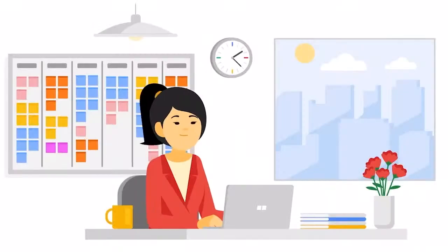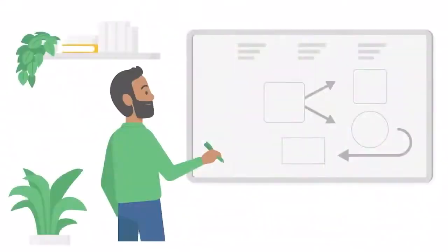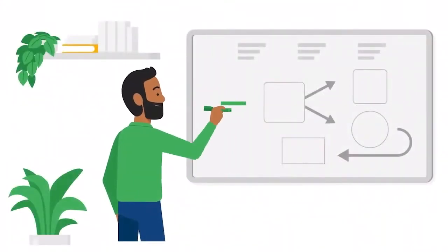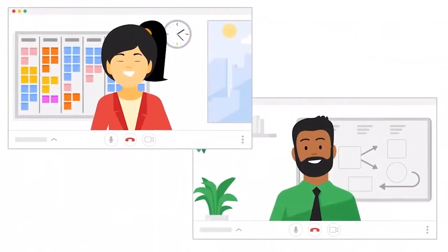You could achieve collaboration by making sure that business people work near the development team, ideally in the same office or virtual space. If that's not possible, maybe co-locating a day a week, encouraging instant messaging, or blocking off time on your team calendars each day or week to collaborate. The goal is to enable easy access between business people and developers.